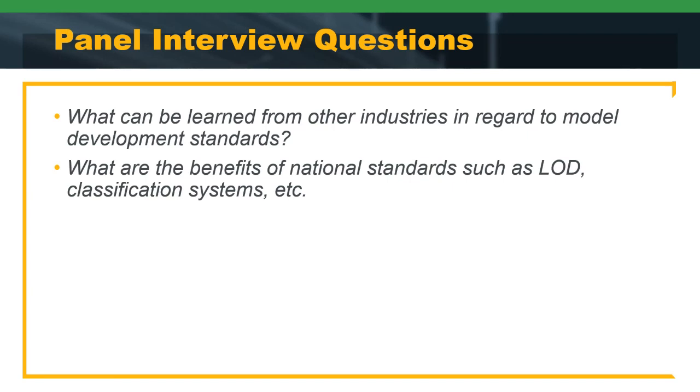And what we found is that the benefits are significant, mainly because the costs associated with implementation of BIM are costs that a lot of times you're going to incur anyways, such as updating your software platform. I don't think there's a choice for anybody to stay on design software that is 10 years old anymore. Everybody has to jump onto the new version of the software because the old software is no longer supported or is being sunset, right? So that's one of the biggest costs related to BIM.